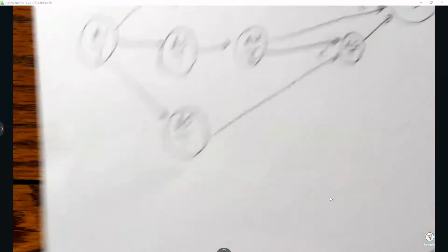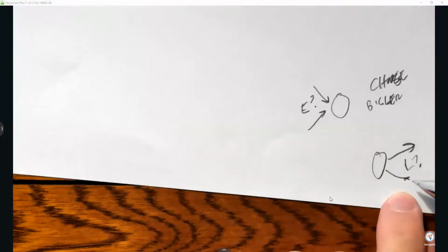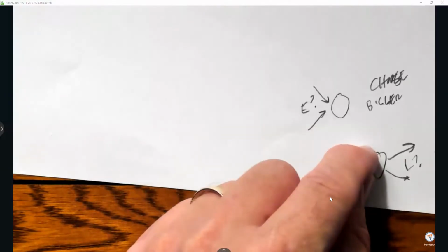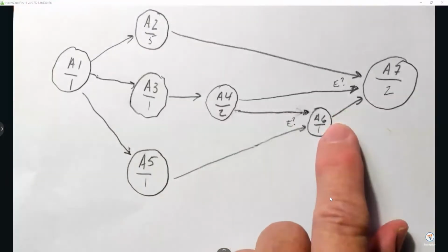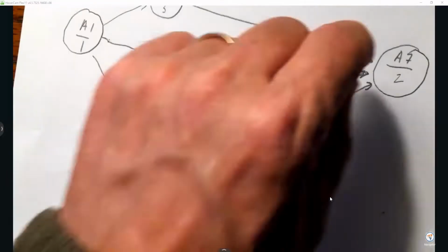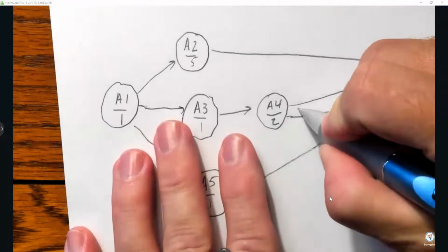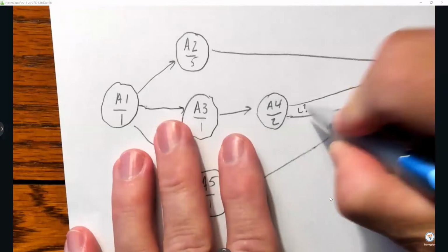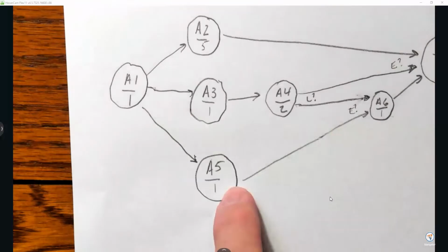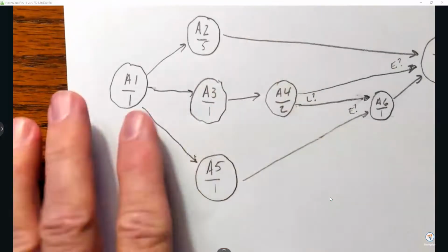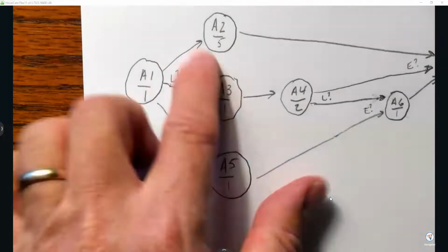Now I say, well, what about the L ones, where you have 2 arrows backing into something, I have to make an L decision. Okay. Oh, here I have 2 arrows backing into this one. I have to decide between these L's. So I put an L question mark. And only 1 backing into here, 1 backing in, 1 backing in. Oh, I have 3 backing into here. So I have to make an L decision here, which L to choose.